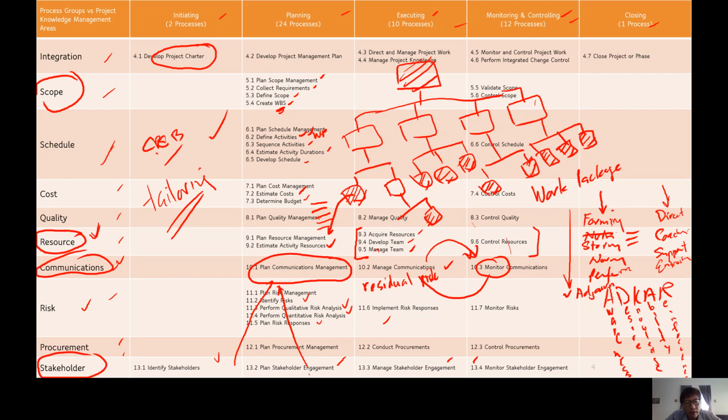I give you the antihistamine to control the allergy. So what you're seeing is that you have removed the fever and sore throat, but it comes up with another kind of medical risk, in this case allergy, spots and itchiness. So what is that called? It is called secondary risk.